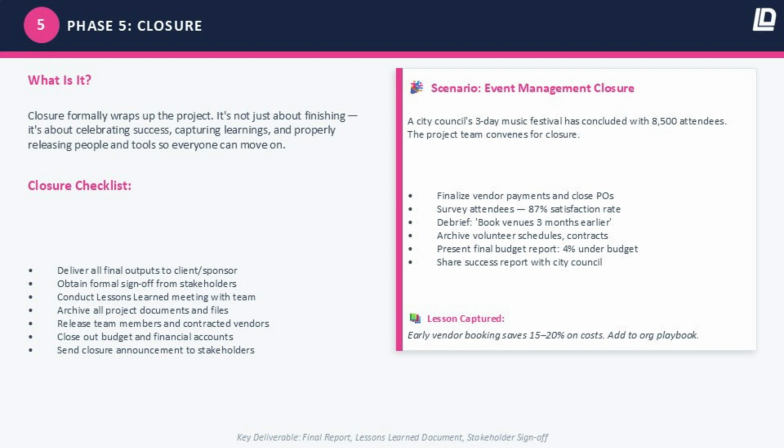Release team members and contracted vendors. Officially confirm the end of their involvement. Close out the budget and financial accounts associated with the project. Send a closure announcement to all stakeholders. Mark the official end. Give the team their moment of recognition.